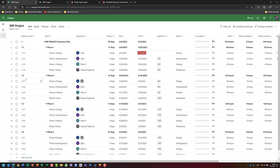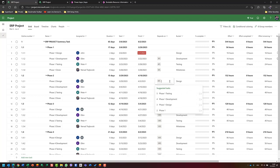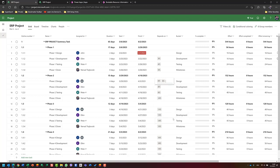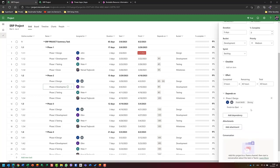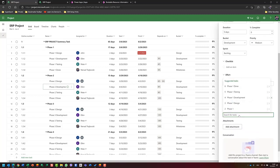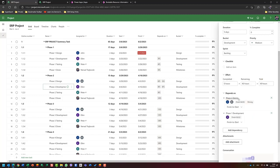Let's say I want my design phase to start in parallel with development and testing. I can do it now. I can go to phase two design, click on it, and say phase two design should be in parallel with phase one design. I can go here and set it to start-to-start.